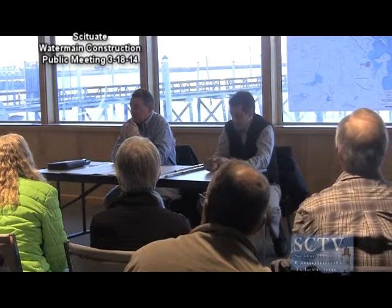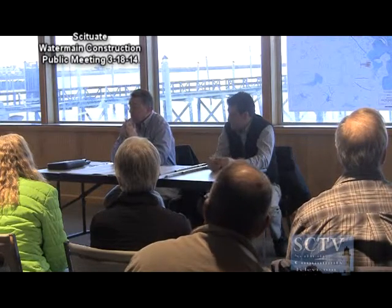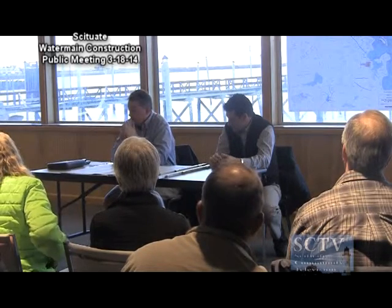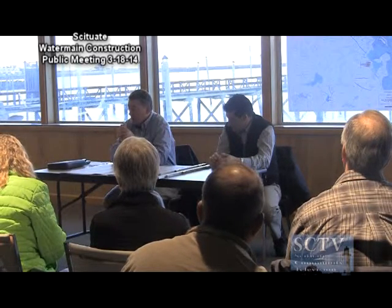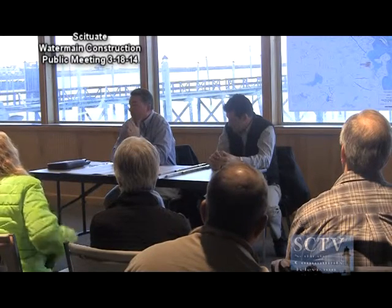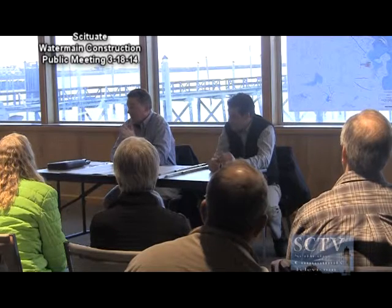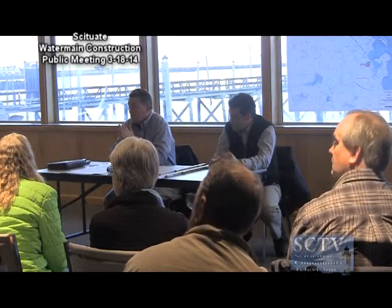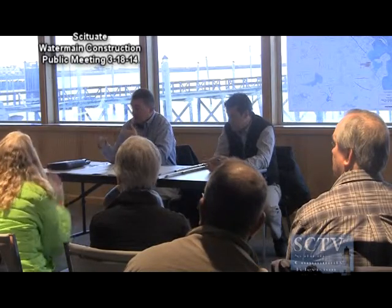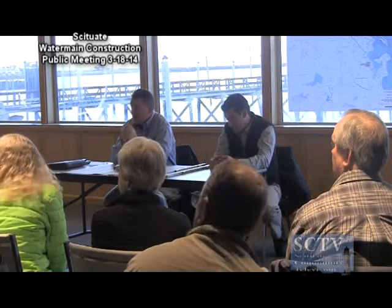I'll go back to Bill for one second. I think we've got three, maybe four of those easements to go down Tilden Avenue to replace that line. We're opening the bid Thursday, and we'll be awarding the job in about a week, so I have to have all those back by that time. Okay, hand delivered, emailed, or by mail. If I don't have them, we're not going to be able to do that section of Tilden if we don't have easements to go down there, just to give you the heads up.